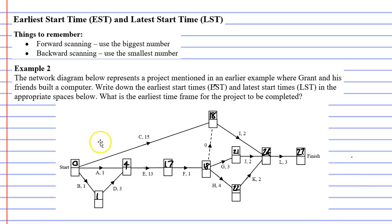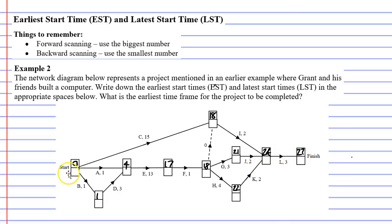We've finished all our earliest start times using the forward scanning method, which means we started at the start and worked forward to the finish. We're now going to find the latest start times using the backward scanning method, meaning we start at the finish and work backward to the start. The finish vertex always has the same latest start time as its earliest start time, so we start there with 27. They should both be the same.